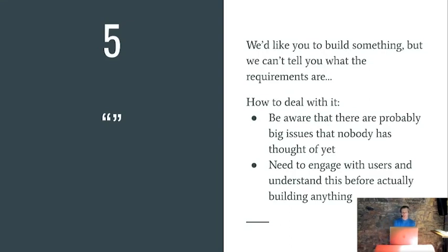And we need to make sure that we are prompting our customers to give us a bit more information, or doing the work for them, but getting them to sign up to it is another approach. If they expect us to develop requirements, then they need to buy into the requirements before we actually start building anything based on them. And there is an opposite to this.